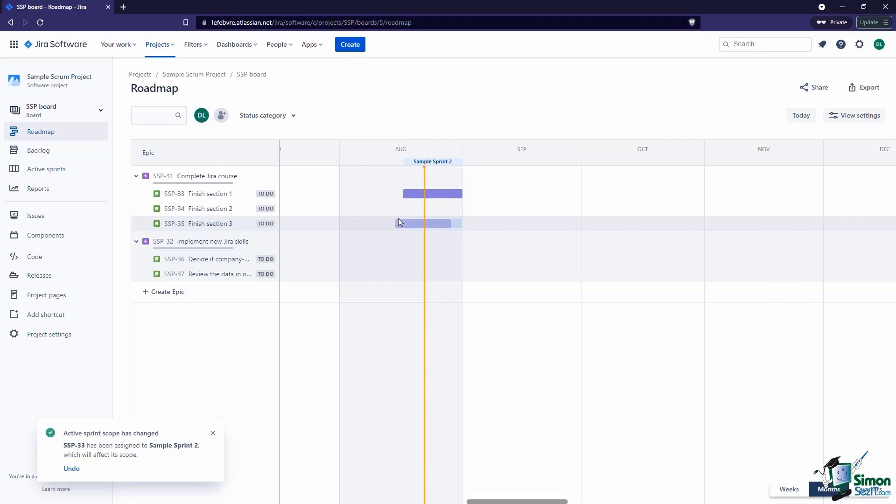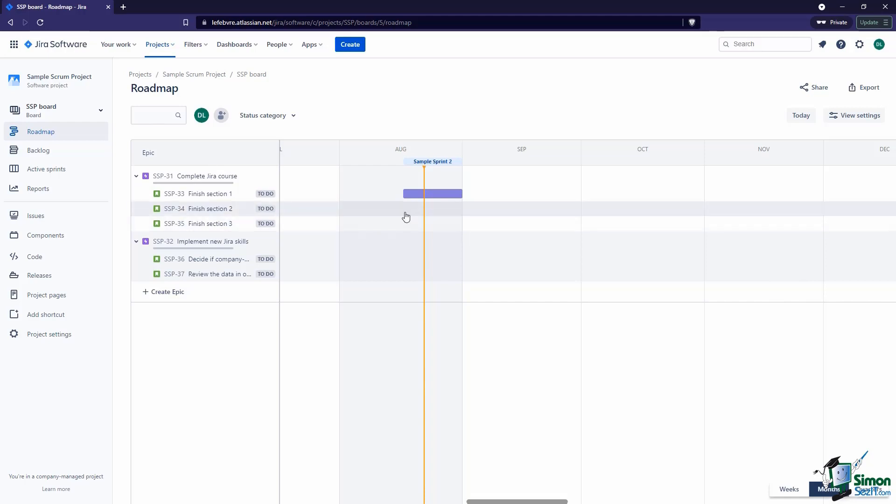What we learned earlier with sprints is in your sprint planning meeting, you're going to decide how much work gets done in that sprint. Say this sprint is two weeks long—what work are we going to get done in the next two weeks? Throughout those two weeks, ideally you're not going to add anything else because you've already decided how much work is going to get done. If you do that in an active sprint, Jira is going to give you a notification and say, 'Hey, the scope is changing,' so you should probably go in and remove something else. That way you're not trying to get three or four weeks worth of work done in two weeks—that's just setting yourself and your team up for failure.